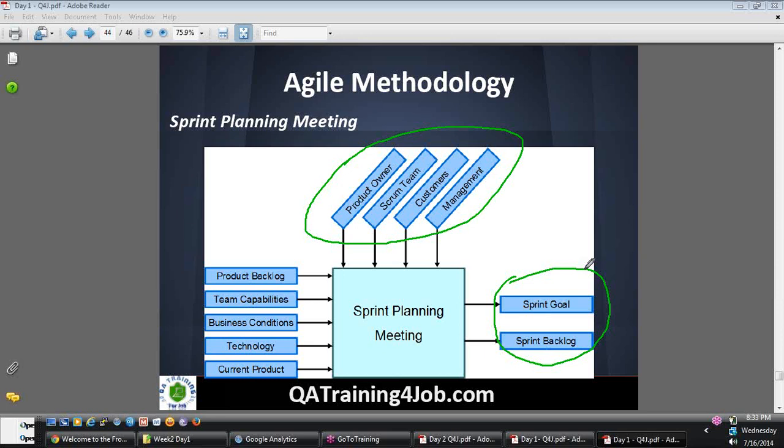So every sprint, if you have like 30 testing tasks you need to complete, each task can take 1 day, 2 days, 3 days. You don't know, but you know that you will be given that work. Finish this by this time. Anything you don't finish will come on to the next one. That means you still have to work and finish all the tasks. That is the backlog content which moves from one sprint to another sprint.